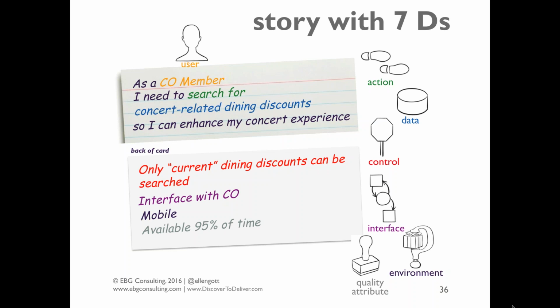Another team that actually built a whole product capability and never talked to the end user about their environment of use, where they would never use a mobile device for these capabilities because they were in a retail store and it would not look good for them to be looking down at their mobile device while playing the role that they were playing in the store, and they had never had that conversation or observing in the field. So they really missed out on the environment dimension. So those are all, you know, some simple examples.